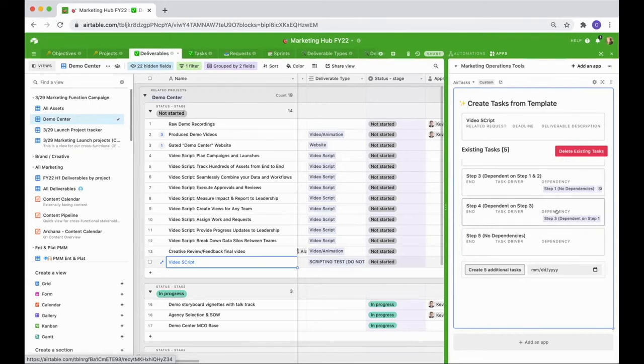That's super powerful because I've already defined that in the template. If I had a due date assigned, it would automatically backfill these based on all of those dependencies and use my due date as that starting point. That's interesting. So it really tells you what day do I need to start this project to deliver it on time, based on the duration of all these underlying tasks.